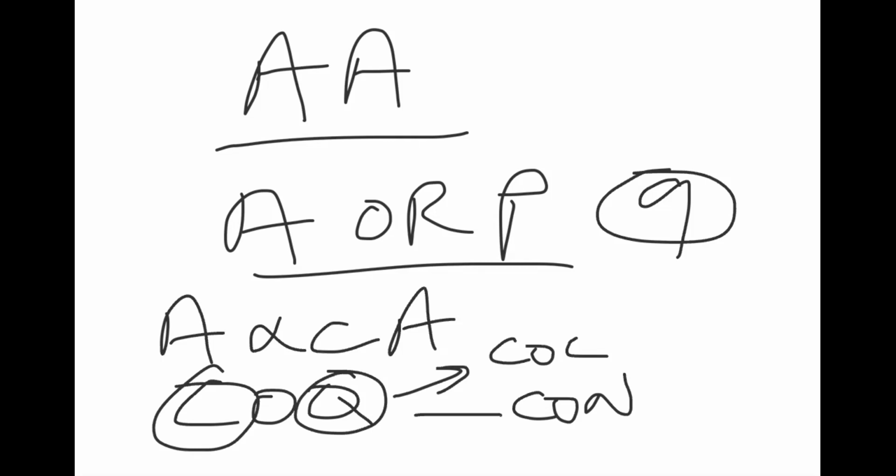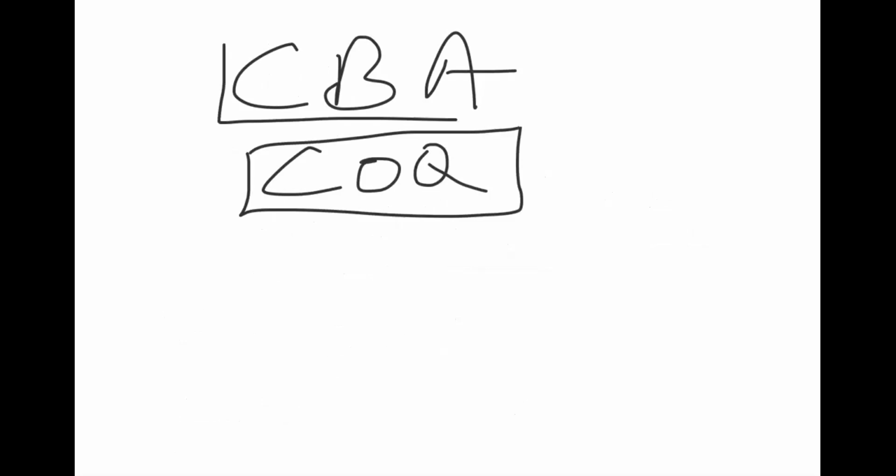Then we've got the cost benefit analysis, and a lot of people get confused. What's the difference between the CBA and COQ? Well, the cost of quality shows you the entire cost you will incur across the product life. It's not just the project, it's the product life. CBA looks at alternatives. COQ does not look at alternatives.